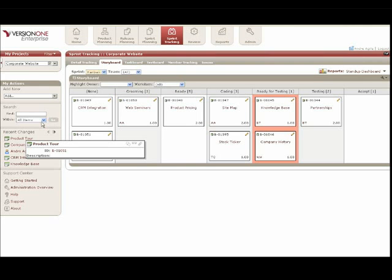Certain steps like development — if you've got ten people, five pairs, a good limit is six because something can be blocked, or seven. That has a practical built-in you can start with. For other things, I'd use the cumulative flow to develop limits over time. Limits can be quite controversial — some shops don't like them. But to me that's a bit like the ostrich with its head in the ground. My advice if I had to give a pointer: let them shake out over time, or use the natural number of people owning a particular state. For development, take the number of development resources and add one or two to accommodate for impediments, obstacles, and blocks.